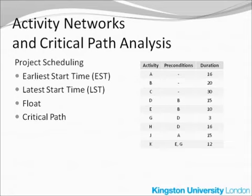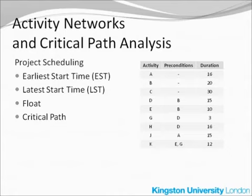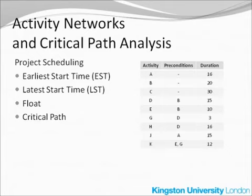As for activity D or activity E, both of them have to wait until activity B is completed, and only then you can go ahead with D and E. Similarly, activity G has to wait until activity D is completed. The activity K has two preconditions — you have to wait until both activities E and G are completed before you go ahead with activity K.